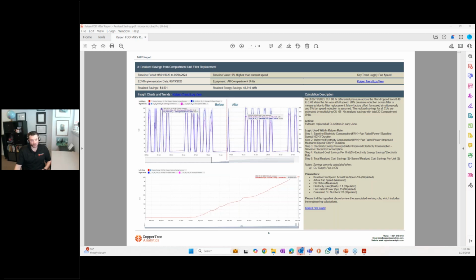When we are working on a brand new building commissioning project, we often are either on the temporary network or whatever network is online once the building automation system is turned on. Sometimes that's a temporary network being provided by the general contractor or the BAS contractor, MEP contractor. Then it runs through the commissioning, and at substantial turnover, control of the network gets merged into the client network.